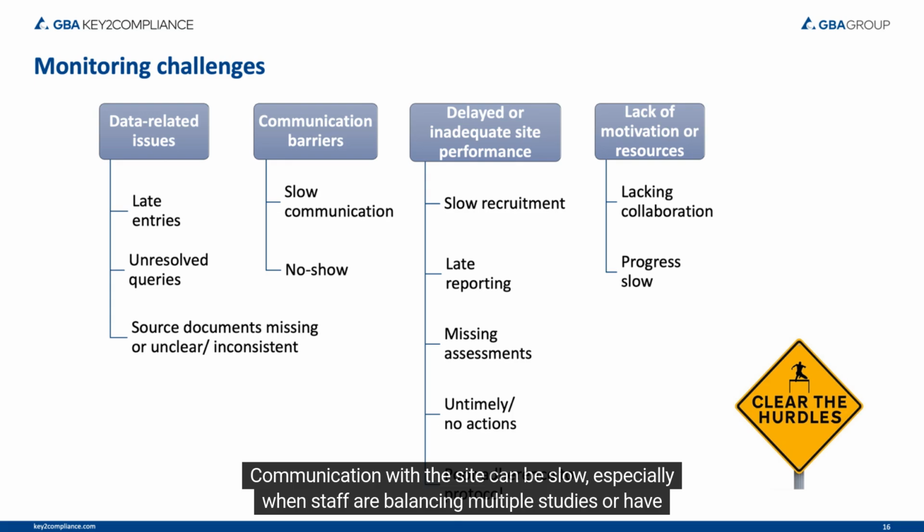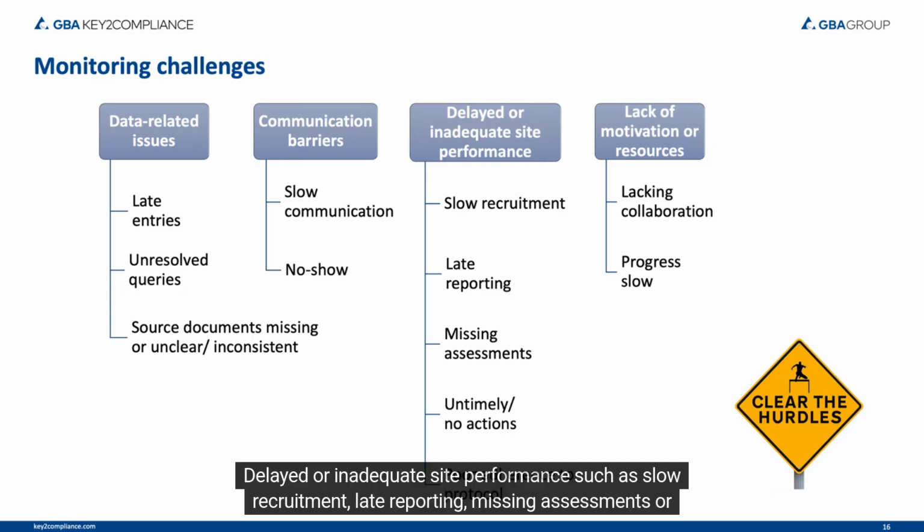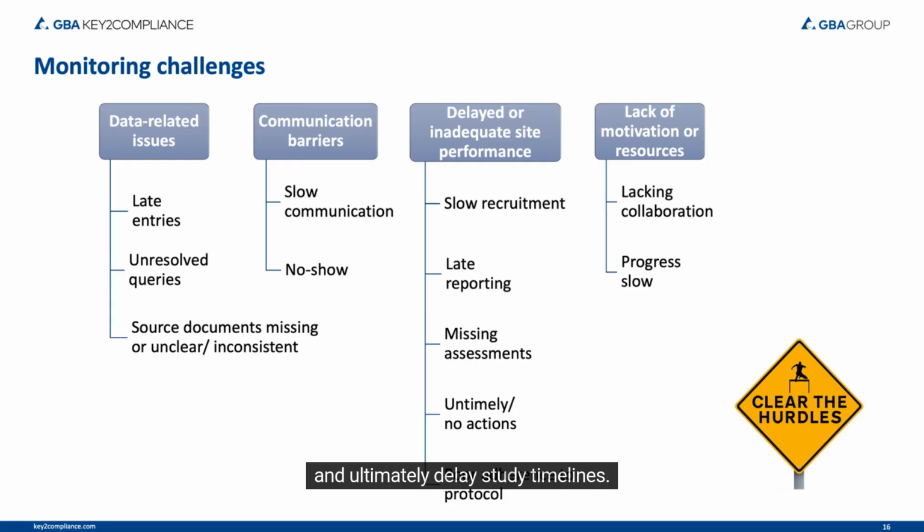Communication with the site can be slow, especially when staff are balancing multiple studies or have limited availability. Delayed or inadequate site performance, such as slow recruitment, late reporting, missing assessments, or untimely actions, can cause protocol non-compliance, jeopardize patient safety, compromise data integrity, and ultimately delay study timelines.